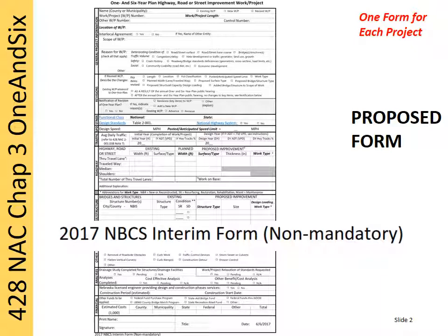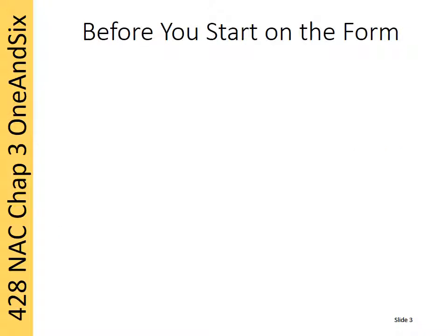The purpose of the form is to disclose to the public basic project information, such as the scope of work, if right-of-way will be acquired, the length of the construction period, the cost estimate, the funding to be applied, and other information. It also discloses project information to the NBCS, such as interlocal agreements, functional classification, design standards that apply, traffic volume data, the status of studies and analyses, potential relaxation of standards requests, notifications of revisions to the 1-year plan, and other information. Filling out the form is quick and easy.